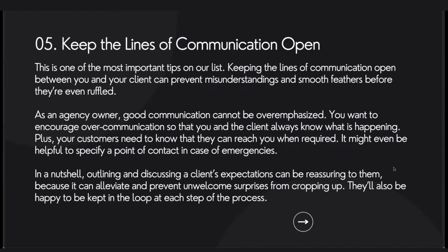So communication is the key to success. Lines of communication always need to be open. And it's all about everyone being on the same page, everyone being kept in the loop. And that's how a project flows. So going back, set the expectation up front of what the deliverables are going to be and the timelines for those deliverables. Like I said earlier, 48 hours for an intake form, and then another 48 hours when we receive their intake form. If it's SEO, we do the keyword research. And after we get that, we're going to do the website overview of the actual client website for optimization, to see how they look to Google, to the search engines.